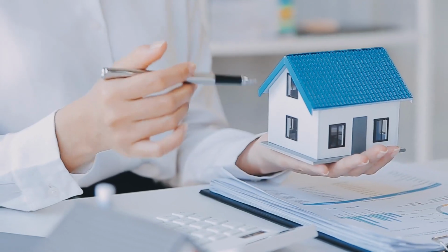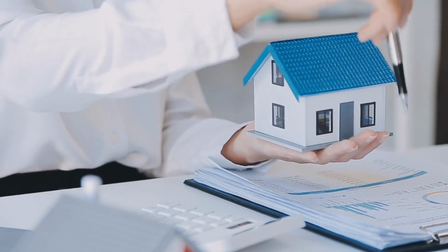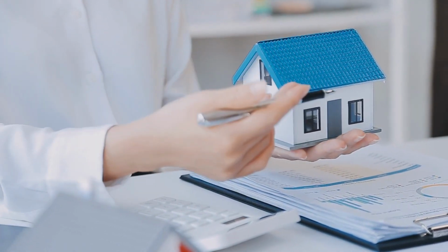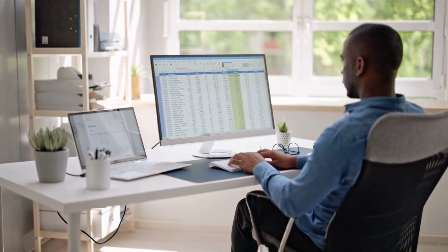They give you back some kind of corrections. Now you take those corrections, and it says, show the setback here. We would like the storm facility to be bigger, the rain drain, the dry well. The water that gets collected by your gutters needs to go into the ground somewhere, collected and dispersed back into the ground. They'll give you those kinds of corrections and essentially to-do items, and you have to go back to the architect. If there's some kind of structural correction, you go to the structural engineer, he fixes that. You get back those fixed plan sets and you submit them back. Oftentimes, you might only have one, maybe two or three reviews, back and forth a little bit, but ultimately your job is to make sure that there's the least amount of time in between those corrections.